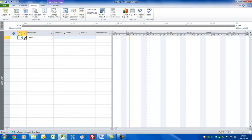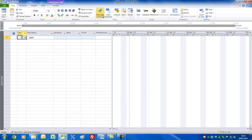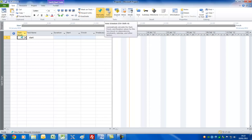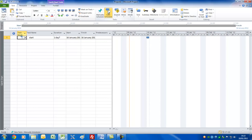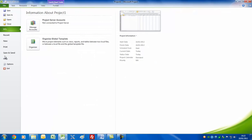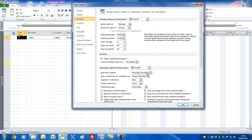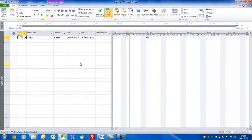Notice we've got something called a Task Mode here, which shows we're using manually scheduled tasks — I don't think that's a good idea. What it means is it's asking you to go and schedule where tasks should start. I believe you should set Auto Schedule. Going back to File Options and the Schedule tab, it's a good idea to set this to Auto Schedule so that that will occur from here on in.